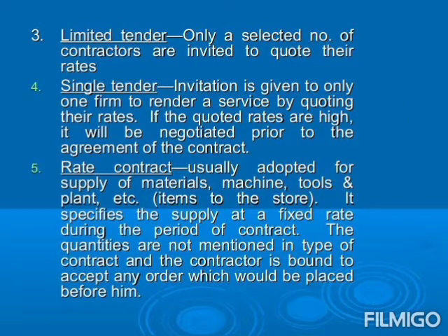Limited tender. Only a selected number of contractors are invited to quote their rates. Single tender. It is an invitation given to only one firm to render a service by quoting their rates. If the quoted rates are high, it will be negotiated prior to the agreement of the contract.